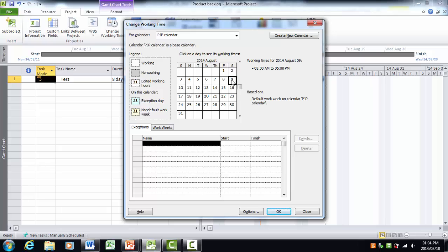So let's say the 9th of August, which in South Africa is a public holiday, and I can say Women's Day, and it will then set Women's Day as a non-working day. Alright, but for now I'm going to delete that. Okay, so that is how you set up a custom calendar.